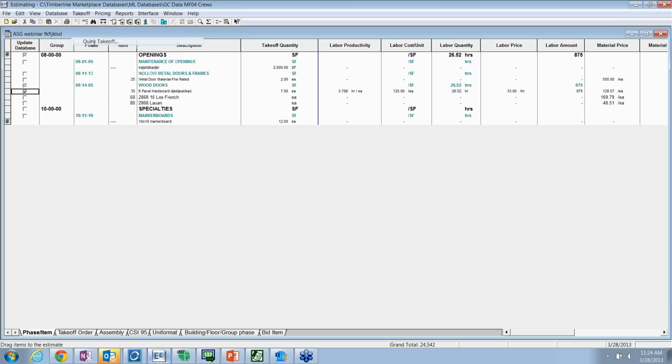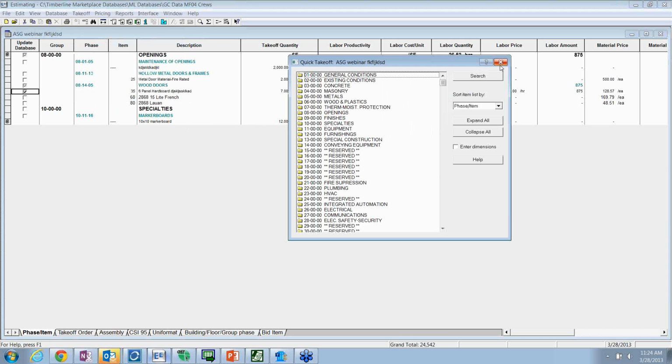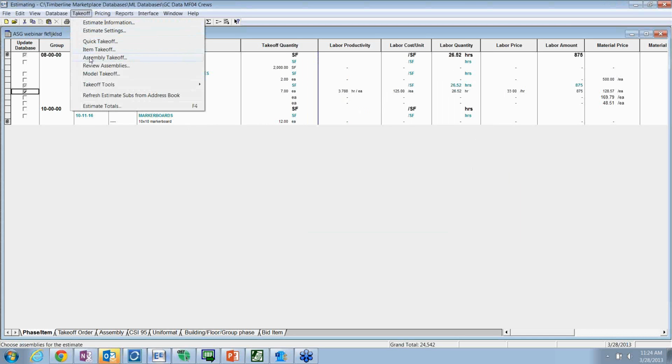So initially when I was over here in this list and dragging stuff in, those are merely items. If I open this assembly concept, you might be doing self-perform work, you might be doing construction management work, where you want to package everything together. Regardless of whether it's self-perform or not, the assemblies concept pulls everything together, think of it like a footing or a wall or a slab or any kind of activity where you need to pull multiple CSI trades together, and then you can answer a question. Items, assemblies, and models just work up or work down. Assembly would be an activity.